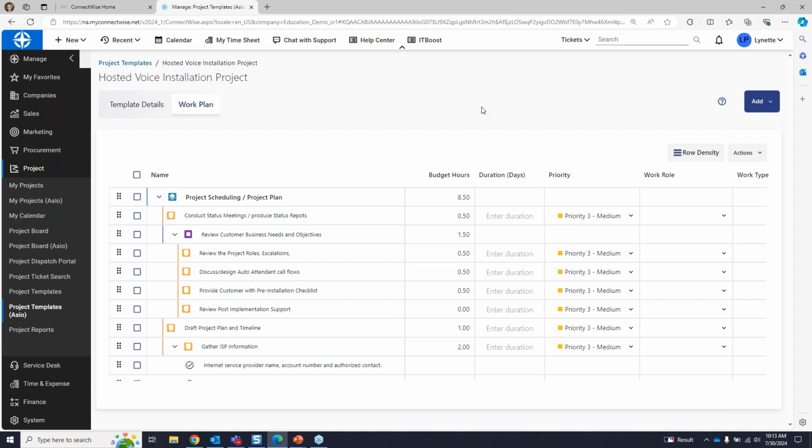There will be linking between skills and ticket type, subtype, and item. And it will automatically suggest who are the best match in the given time frame, based on your dependencies and the duration. And then it will create a schedule for them. And you just have to readjust based on your best understanding, like if you want to change it to someone else, etc. So this is going to be very useful.